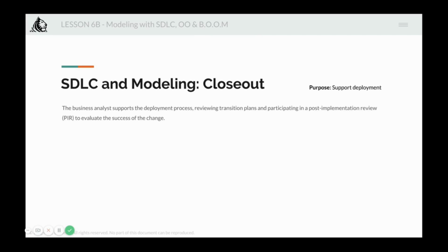And finally, the closeout, right? So the business analyst or the product manager supports the deployment process, reviewing transition plans and participating in the post implementation review, which is also called a retrospective. You will do a retrospective after the closeout has happened, after the product has been built and shipped. You will do it after a week or a few days to look back and see whether the impact is equal to what was estimated, or what is the gap between the estimated and the real.